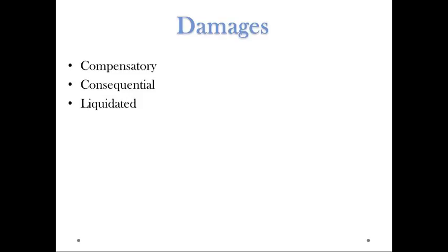It's complicated. On one of those phases, there was a contract that provided for a completion date by the contractor to open the highway back up of, let's say, June 1st. And it provided that for every day the project was late, in other words, went past June 1st, the contractor would have to pay the city $3,000. That'll get your attention. It also had a provision that for every day the project was early, the contractor would get a bonus of $3,000, which I thought was fair.